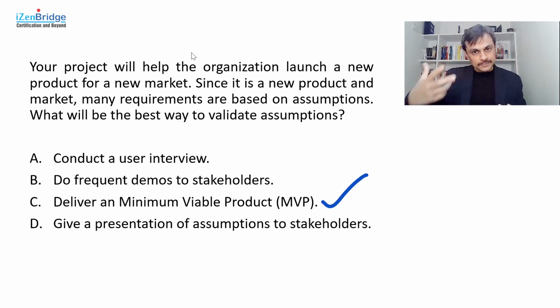You can observe their behavior and you can collect more insightful inputs. That's the reason it is promoted to produce a first version of the product, which can help you in learning, not necessarily earning, but learning about your customer behavior. And that's the basic utility of MVP, to validate your assumption in the best possible way.